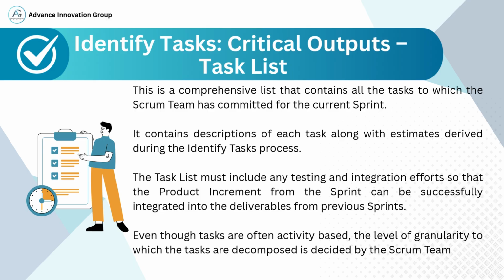All committed tasks: development, testing, documentation, integration, deployment, and any required spike or research work. 2. A brief, actionable description of each task so that any team member can pick it up without ambiguity. 3. Effort estimates, typically in hours or ideal days, that were agreed during the Identify Tasks discussion.